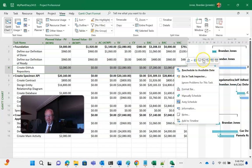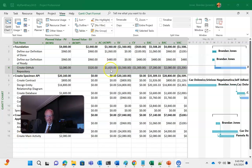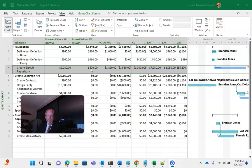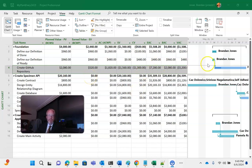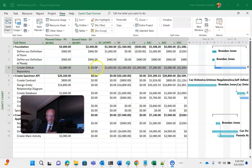Let's also say that this one is maybe 25% complete. Aha! Now, look at that. You see the actual cost of work perform has changed from zero, and the earned value has also gone up from zero to $520. This is a bit of a complicated task because we extended the estimate that we thought would take to complete it. We also have a percent completion, and it's behind where we should be at this point in time. So the day I'm recording this video is represented by this black line here. And if we were on schedule, this darker blue line, which represents progress, would be all the way up to that black line. So several things at play here, and you can see that it changes the earned value and the actual cost of work completed when we adjust that.